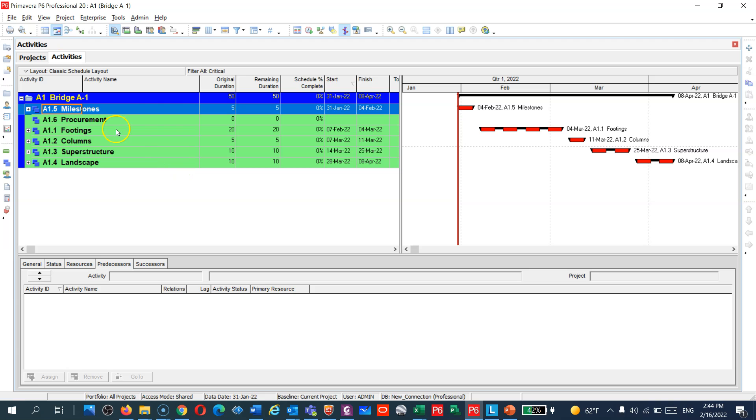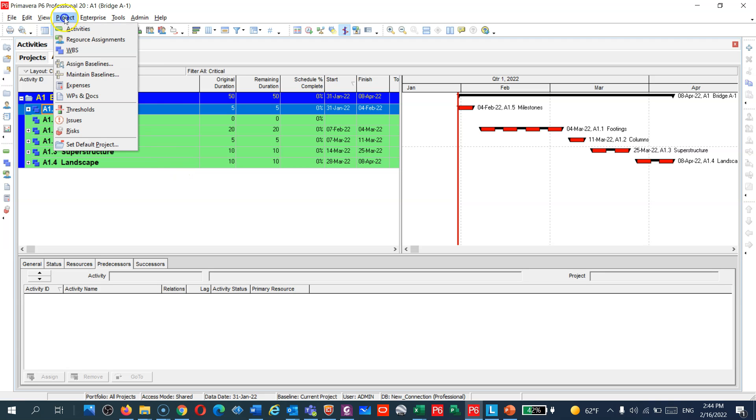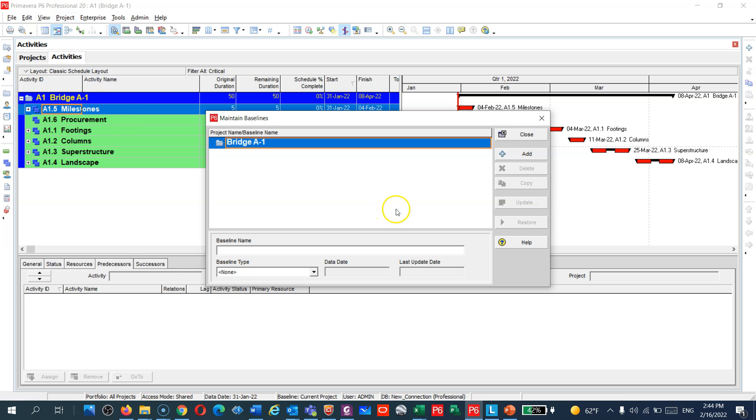How to create a baseline? You can see guys here, Project, and then you have two tabs: assign a baseline and maintain a baseline. So maintain a baseline means you have to add a baseline here. How can I do that? You see this plus sign.